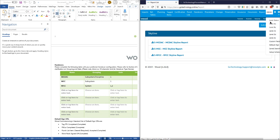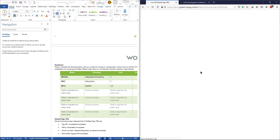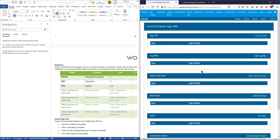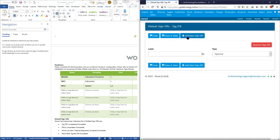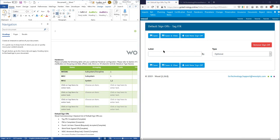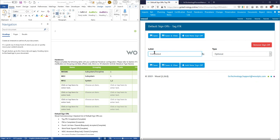The last thing we need to do is set up the default sign-offs. As I explained in episode 101, the default sign-offs are basically to try and cover off as many of the ITRs or deliverables as possible. You can configure these on an ITR-by-ITR basis or a work-list-by-work-list basis, but if you put defaults in that'll cover off most of what you need to do. We're going to use the default ones we would normally recommend, which are: completed, accepted, and approved.